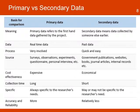Primary data refers to first-hand data gathered by the project. It is expensive, takes more time, is specific to the needs of the project, and is more accurate and reliable. Secondary data is data collected by others. It is less expensive, takes less time, may not be too specific to the interests of the project, and is less accurate and reliable. The project manager will need to decide and make a combination of both types depending on the indicator and constraints of the project.